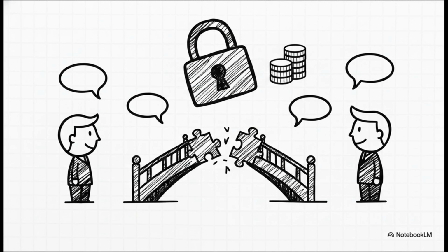So when is this the right move? Well, mediation is the absolute perfect tool when our team needs to retain ultimate control over the outcome, ensure strict confidentiality, and, most importantly, salvage their long-term working relationship so they can actually finish the project. It works wonders for payment disagreements and pure communication failures.